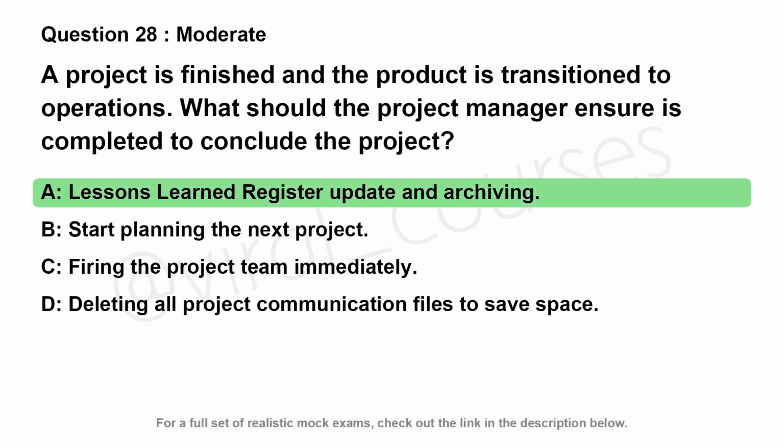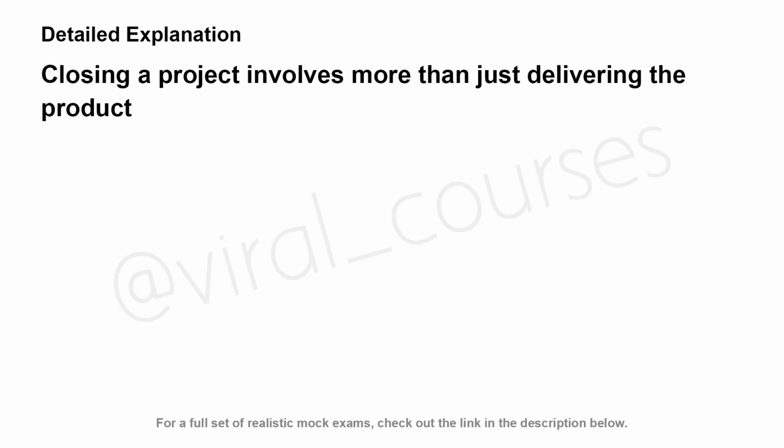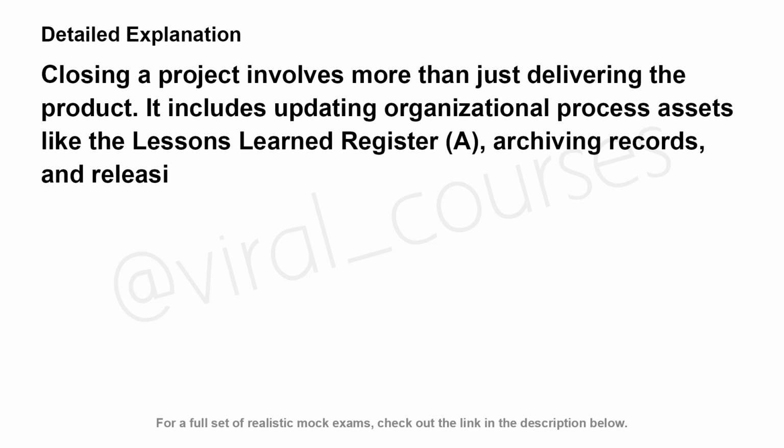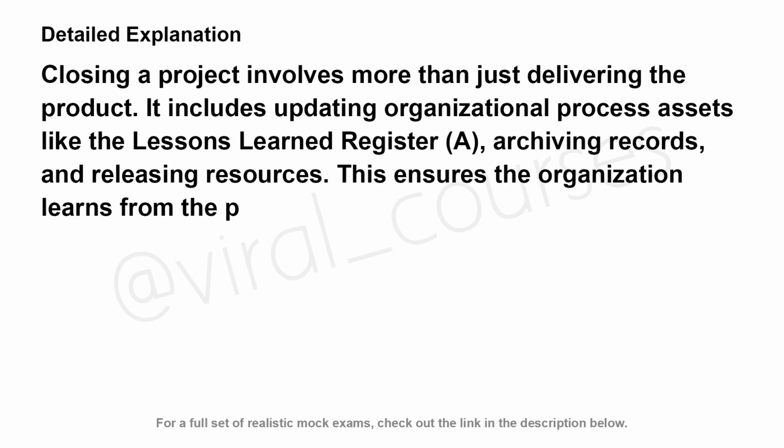The correct answer is A. Closing a project involves more than just delivering the product. It includes updating organizational process assets like the lessons learned register, A, archiving records, and releasing resources. This ensures the organization learns from the project's successes and failures.